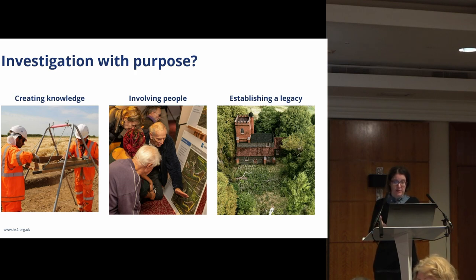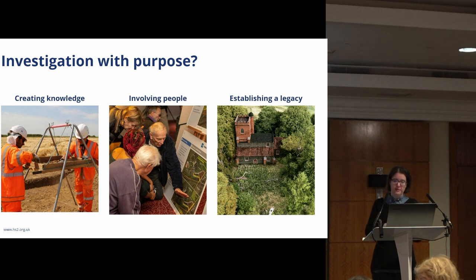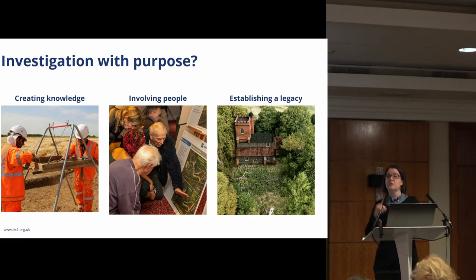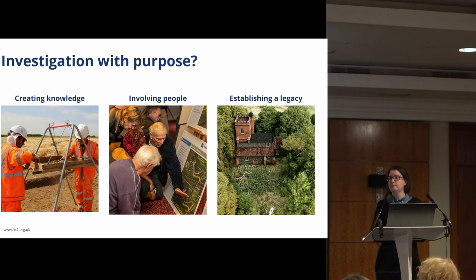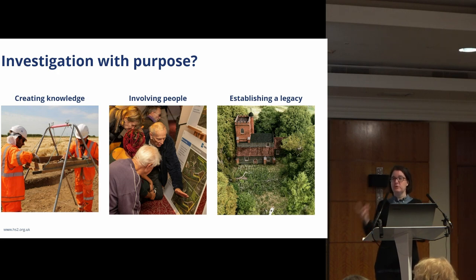Removing waste and ensuring value — value is really key for us at HS2. We've got the public purse; we need to make sure every pound we spend is doing good, that we're gaining the most for the least spend. We also want to make sure we're doing the best for the historic environment, conserving it through understanding it. Lean will enable us to understand why we are doing something and think about whether we need to take an action or whether no action is actually the best action. There's also salvage and reuse — on HS2 at Costal Farms House we recovered timbers and bricks and sent them to local projects to be reused, which reduces waste and feeds into reducing your emissions and carbon footprint.